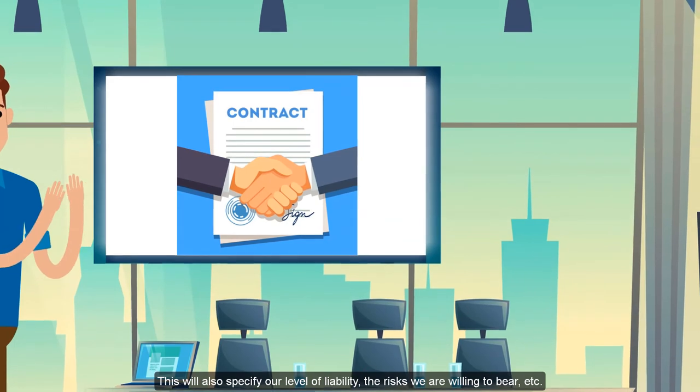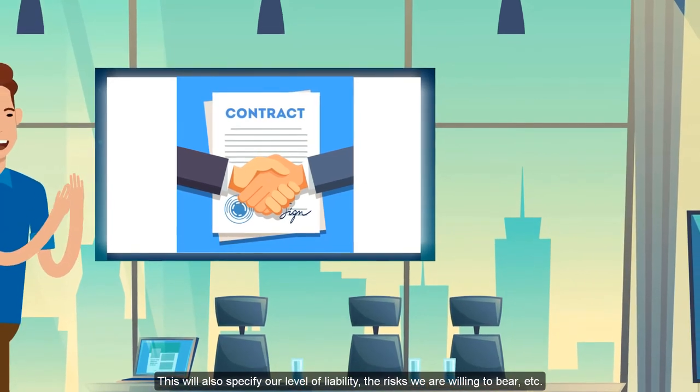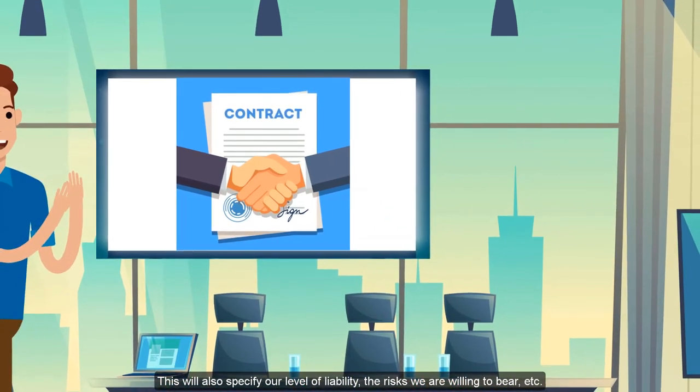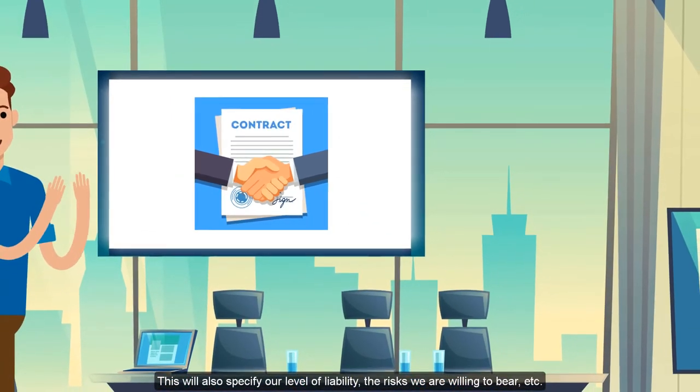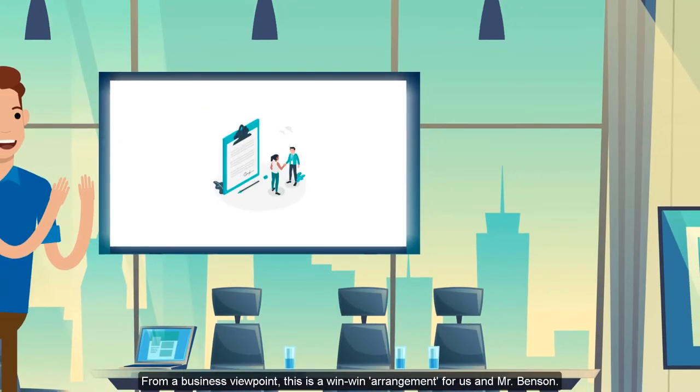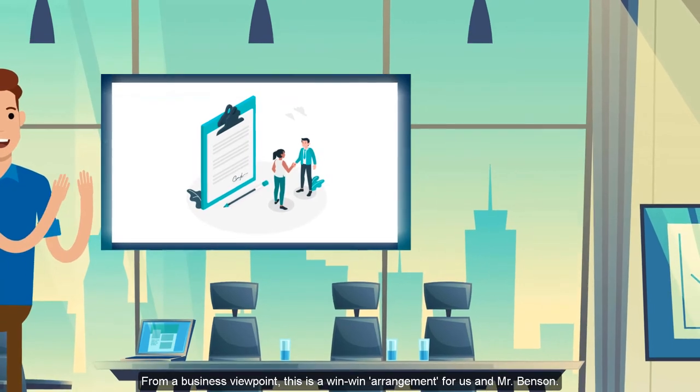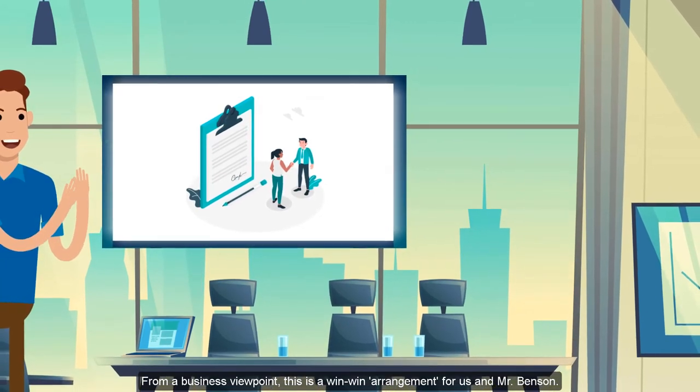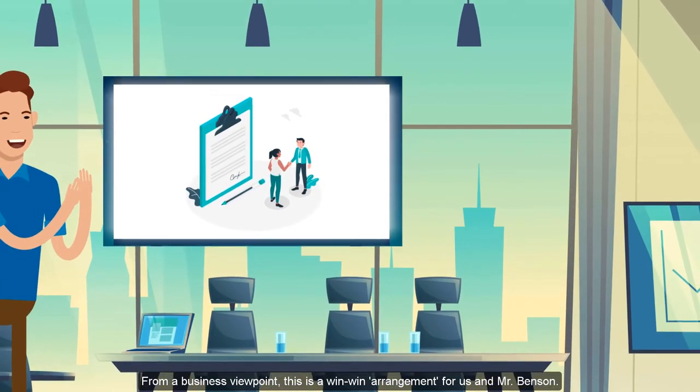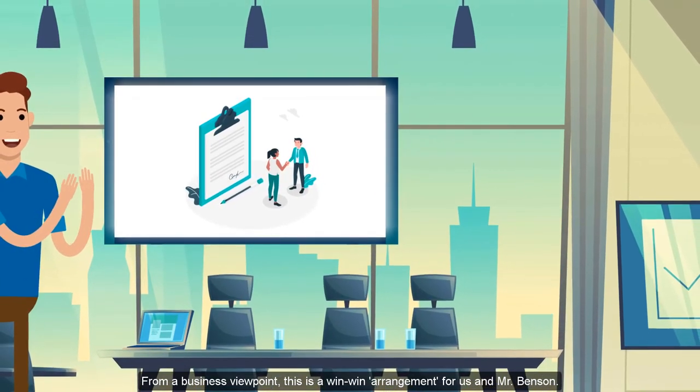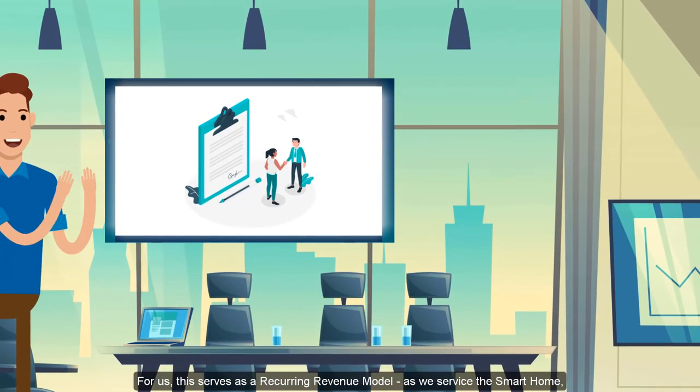This also includes the binding agreement that specifies our level of liability and the risks we are willing to bear on the building. All this is what we issue during the handover process.